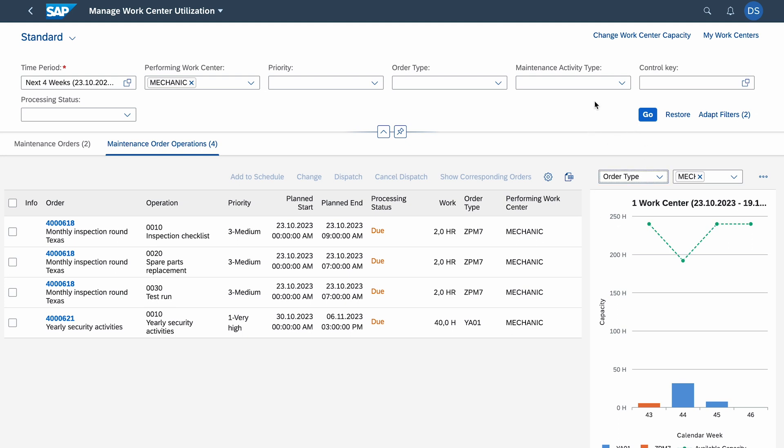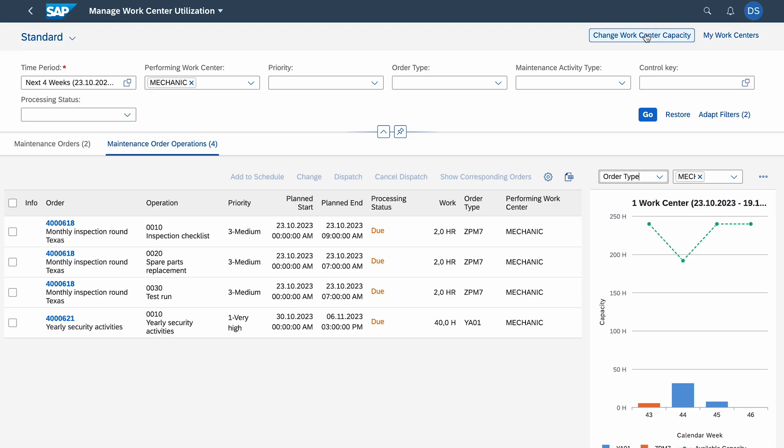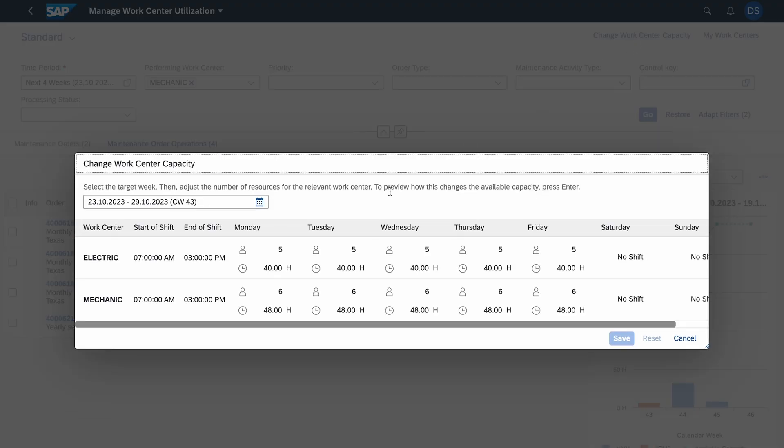What's important, we can have a look at this button Change Work Center Capacity. If you remember from my slide, mechanics have six mechanics, each guy works for eight hours, so it's 48 hours. Let's click it and see if it's like this. Exactly. Mechanics work from 7 a.m. to 3 p.m. like electricians, but here we got 48 hours capacity. For electricians we got 40.